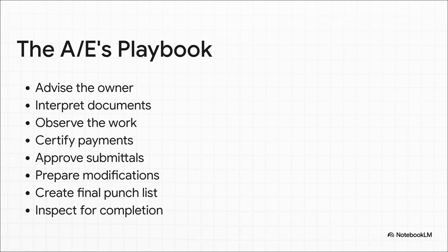So what's in it? Well, they advise and consult with the owner. They're the official interpreter of all the contract documents, which is a huge deal. They observe the work as it's happening, making sure it actually matches the plans. They also handle a ton of the critical paperwork, reviewing and certifying payments to the contractor, looking at submittals for materials to make sure they're the right ones, and preparing any changes or modifications that need to happen.